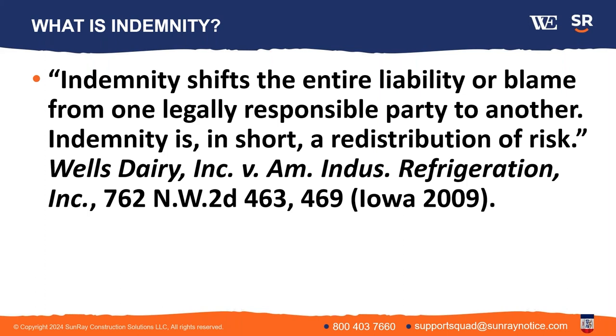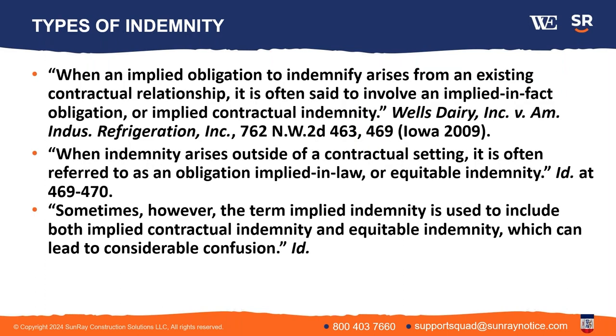And so that's important to remember, because if you have an indemnity obligation in your contract, that's going to shift the entire liability to you if you're obligated to do that. So that's the definition. That's what we're talking about today. And there's different types of indemnity. There's the contractual indemnity, which again, contractors, owners of projects, that's common. It's a common contractual term.